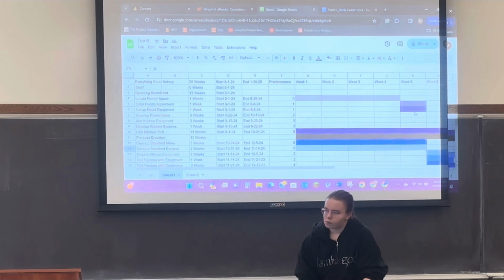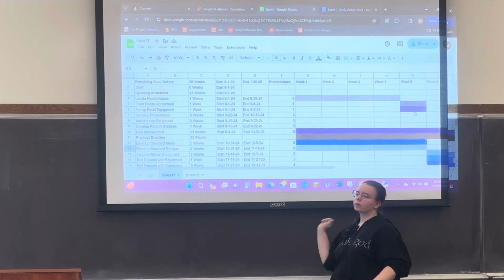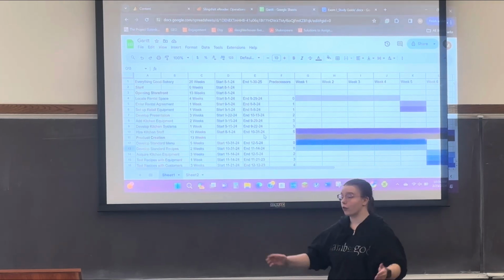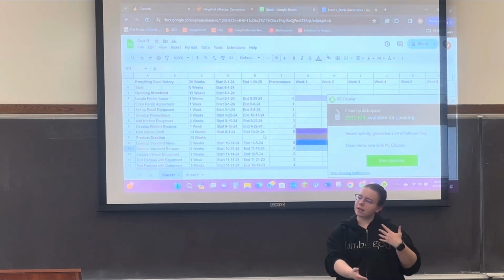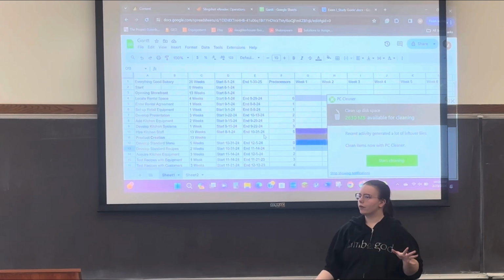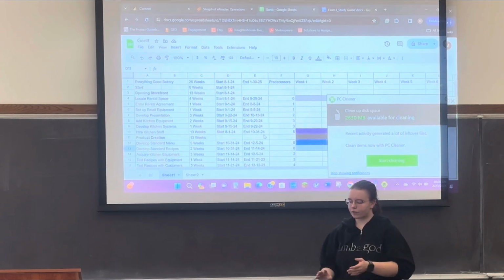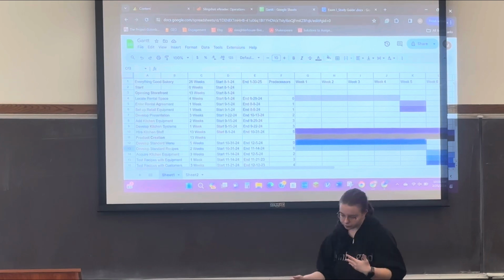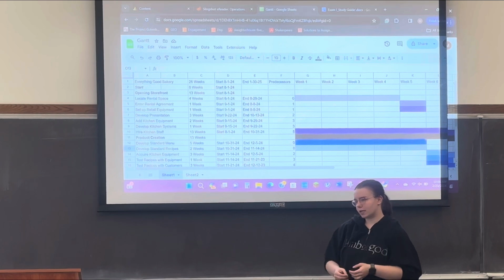Maxine, how did you determine half a year? Like, did you just determine that at the beginning, or did you look at the different steps? I looked at the different steps for how long, because also, if you'll notice, the hiring and kitchen staff took up the full 13 of that first half, because I wanted to make sure that I would have enough time to do a vetting process and do a full work through of, do they have the skills, do they not have the skills, who can I hire. Each of these steps gives me ample time to make sure that I have time to do what I need to do. And to train them in the way that they need to be trained. Exactly, and that comes in the second half of the 26 weeks.